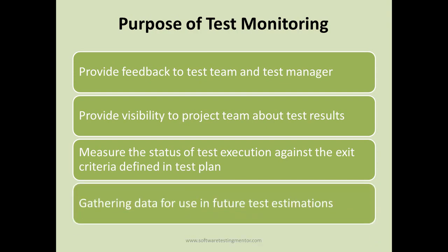Then you gather data for use in future test estimations. That's another purpose of test monitoring. You gather the test monitoring data which is used in further test estimations. Suppose you did some estimation in release A for test execution of 100 test cases. You estimated 30 days and you were able to finish all those 100 test cases in less than 20 days.